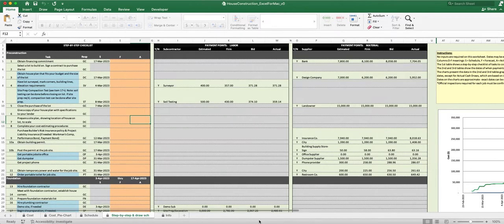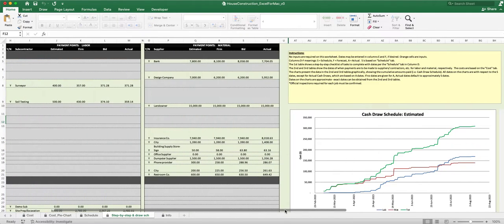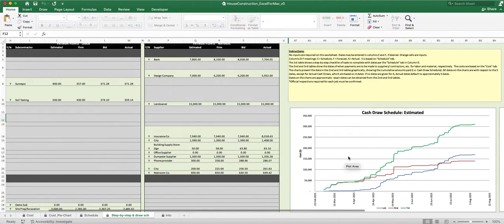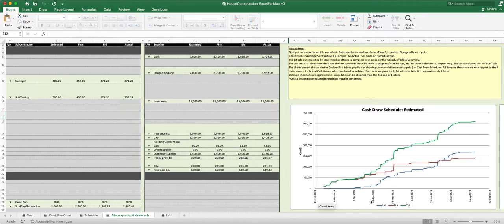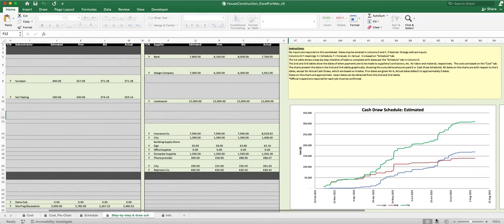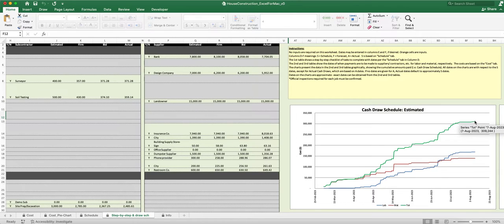All this information also feeds into a draw schedule. A draw schedule shows your bank how much money you need and when you'll need it. It breaks down labor and materials, with the total shown in green. As you go from February through March, April, May, and June, you can see how much money you'll be pulling out each period, on which date, and the running total — until you get to your final amount pulled out at the end of the project.